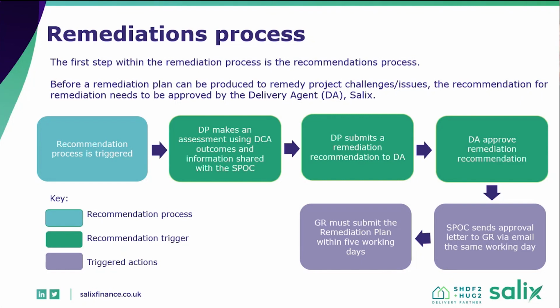It's the responsibility of the GR to prepare that plan, and we will support you in those activities, and then we look to present that to the delivery agent. So there is a five-day target to complete that plan. We'll deploy the resource to assist you in that. Generally, we're in a position where we're able to complete that in five days if the level of preparation is there. Obviously, it is a tight timescale to achieve, so we expect you to put all the resources in place to do that, and we will then follow an escalation process.